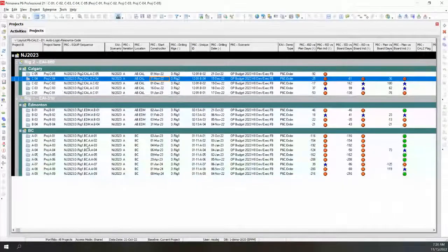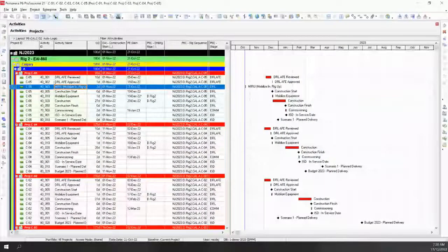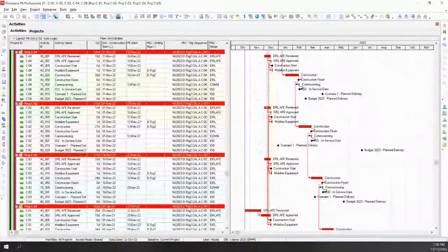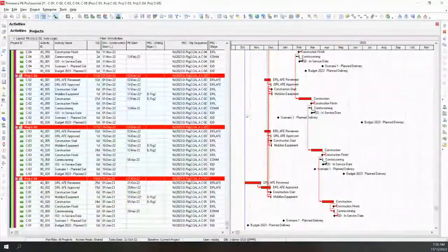So then it's done its thing, and I can keep refining this scenario. I might put a few of these wells onto rig 2. I might introduce a third rig. There's a lot of different ways that you can use this, but it saves so much data entry, so much manual work. And the code is what's controlling the way the order looks. So the order's always being kept chronological, which is fantastic because if you're producing a Gantt, you don't want people to have to be scrolling through 10, 20 pages of Gantt chart to see what they're working on.